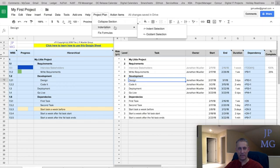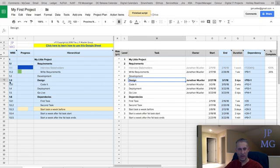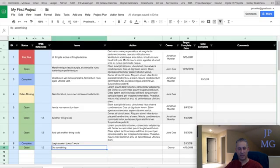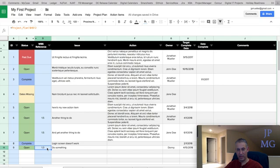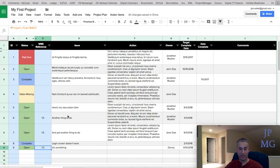So let's go out-dent. So that's going to change it to a 2 there. And it changes the WBS to 1.3. Let's see what it did on the action items tab. Notice it preserved the WBS reference. Because it's exactly that. It's a reference rather than a hard-coded number. So it's flexible to understand when we insert different tasks that cause our work breakdown structure identifier to change, it will change accordingly here as well.